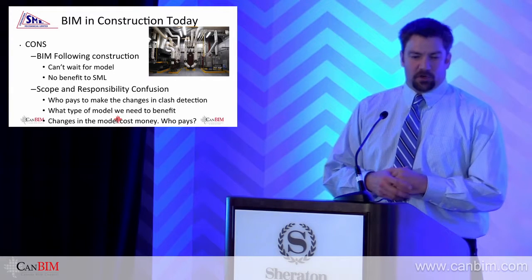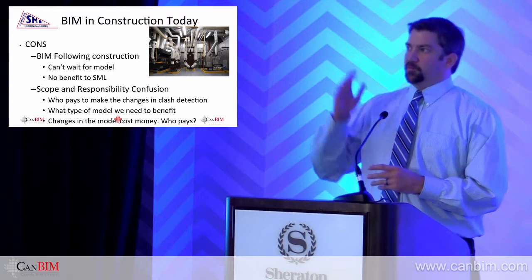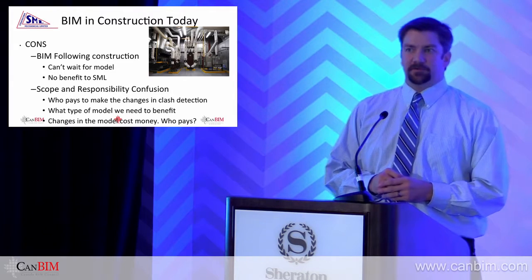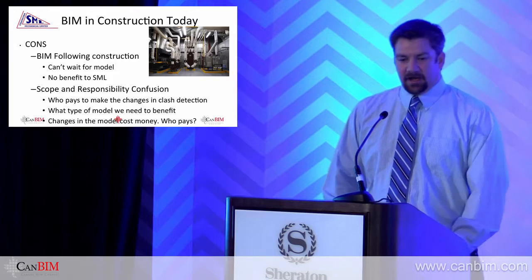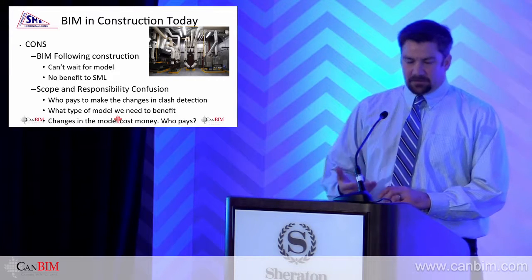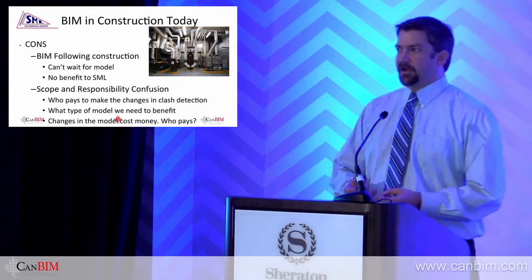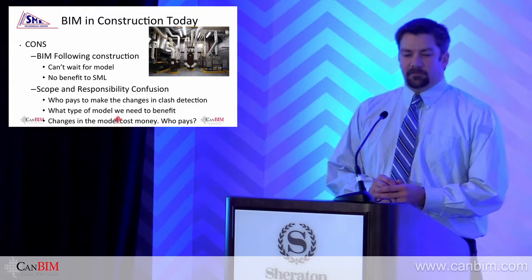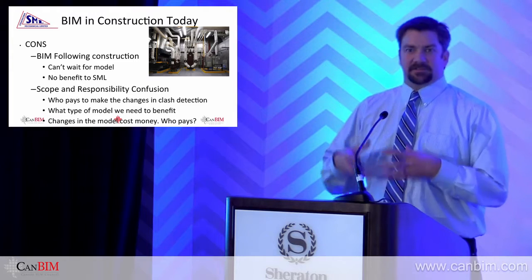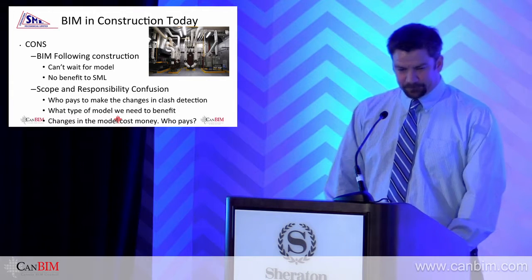Another thing that we've been seeing a lot is scope and responsibility confusion. When there's a clash, we're running pipe and electricals in our way, or vice versa. Who's going to make that change? Who wants to move? Who's going to pay for the model to be changed? That's a big misconception a lot of times when talking to other mechanical contractors and other contractors that are involved. How did we do it before? We worked it out on site. Now we're working it out in front of a computer, which is nice to see, as long as there's a format on how BIM is controlled, as long as there is a central area of who's going to be the master if there's a disagreement of who's going to take control.